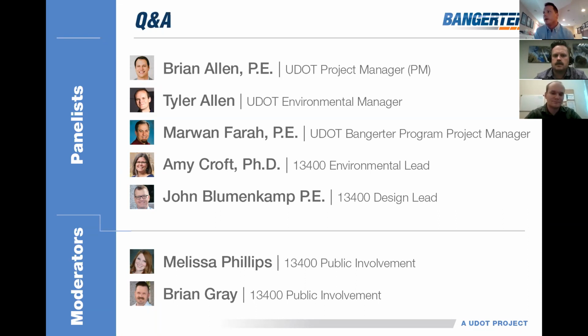Yes, so there will be an opportunity to look at the preferred design at what we call a formal public hearing before we finalize the SES. We like to present the SES to the public. That will be this January, February timeframe. We'll release the draft SES, which will show the preferred design along with all the different alternatives we analyze. We'll collect comments from the public, evaluate them, and determine if we need to make any alterations to our preferred alternative, and then we'll finalize the SES.